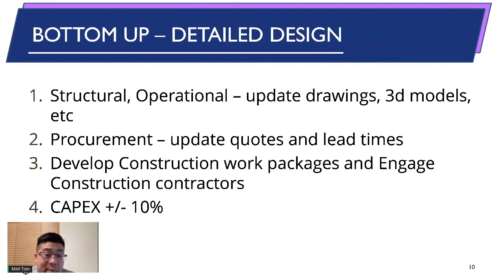Of course, we'll move into detailed design. More of the same. Except now you've got really exact drawings. You've got really exact 3D models. You've got all your quotes updated and all of the lead times. You've engaged with your construction company and you're issuing work packages. You're issuing the permits to the city, all of that stuff. And then you've got really, really tight estimates here on where things are going. This is probably the thing. This is the final stage. And everybody's like, okay, we're ready to start. And you've committed serious resources into the design at this point. So this is that final stage where everything is going to get tied up as much as it can. There's always things that are going to be missing here or there. Over here in California, I deal with the power company. And you've probably heard the horror stories with PG&E. And so there's always things like that that are going to crop up. But this is kind of where we're pretty sure of what it is that we're going to do. And now we're going to do it.